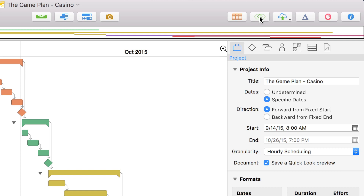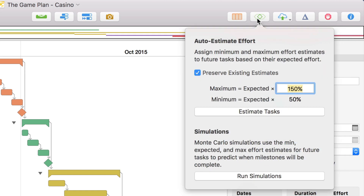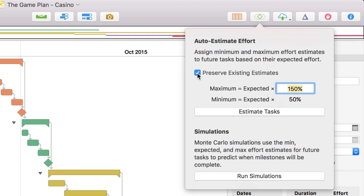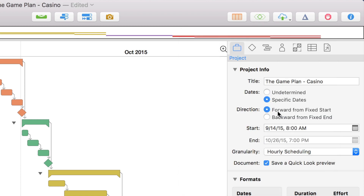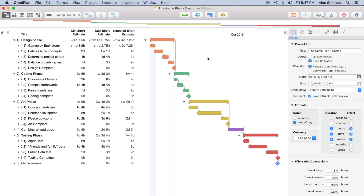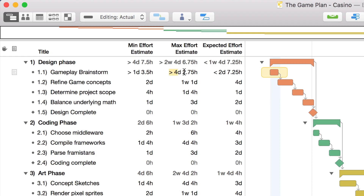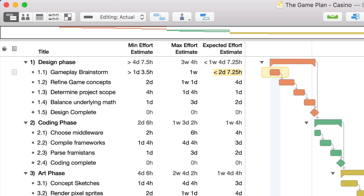If we click on the simulation button in the toolbar, we can jumpstart things by telling OmniPlan to auto-estimate the possible range of effort required to complete each task — calculating the maximum and minimum effort to be plus or minus 50% of the original estimate. If you want to be even more accurate to your specific tasks, you can edit the effort estimates yourself.